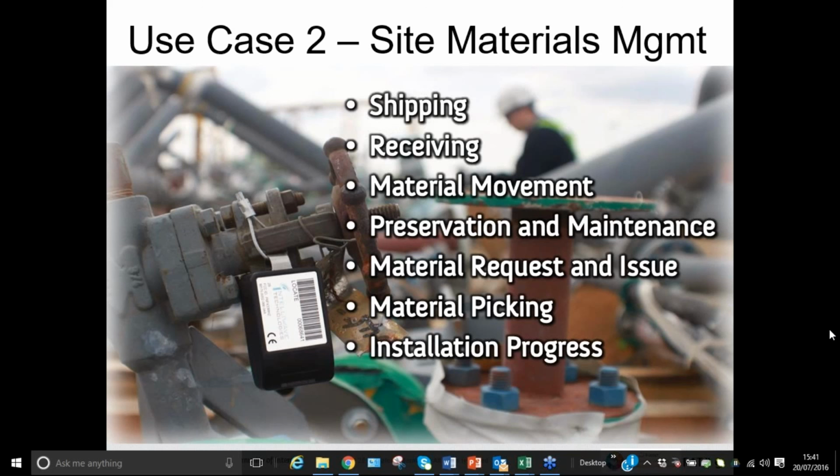And if you look at the next side, which is, if someone's requested those materials for construction, the workers can take their mobile device with them as they get their pick ticket signed off to the construction crew. Okay, so all that's done right in real time, and you know who did it as well, because beyond the digital signature, you also have a real person that you've delivered it to, and a location as well. So all that makes it much easier if there's a crew shift during the installation process, so they know exactly where that material was laid down for construction purposes.